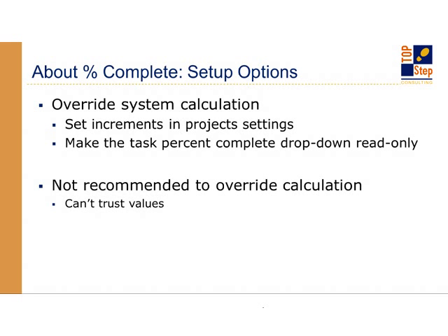But I generally will make that percent complete drop-down read-only. It's too much of a temptation. And if you start overriding those calculations, the problem is when you're running reports, you're never really sure, is that manually overridden or is that a system calculation? And then you pull out your calculator and you say, no, okay, that's the calculation, I'm okay. Don't even go there. If you start distrusting those values, it's not worth it.